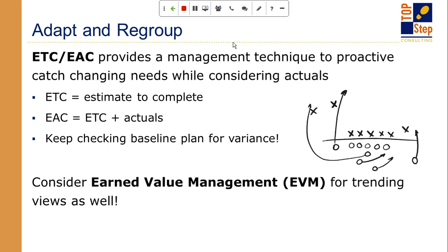And that's a really helpful metric, especially at the end of the project, when you're at actuals. But as you're delivering the project, you're watching that EAC, and then at the end of the project you can see that actuals versus plan and understand if that needs to impact or influence how the forecasting or the scoping happens the next time around when this project is done.